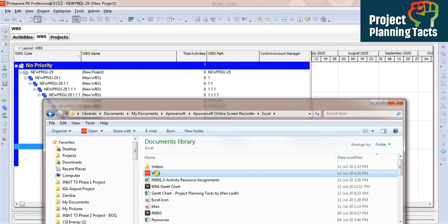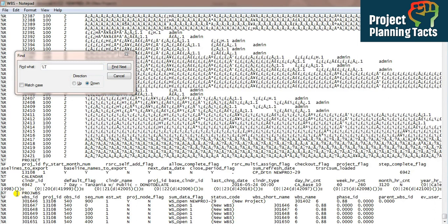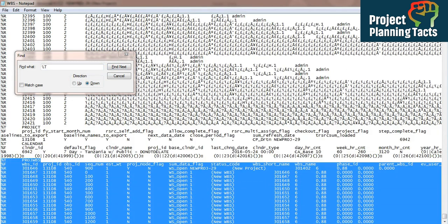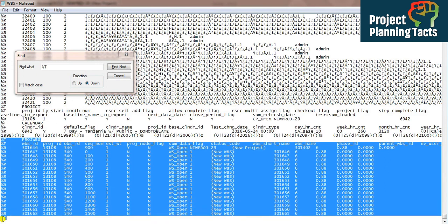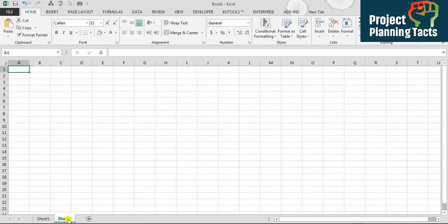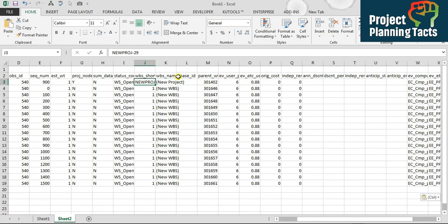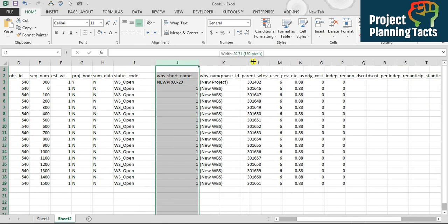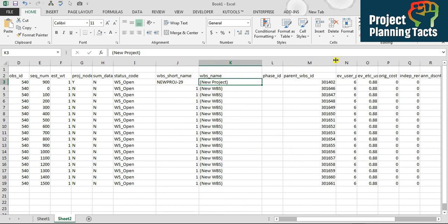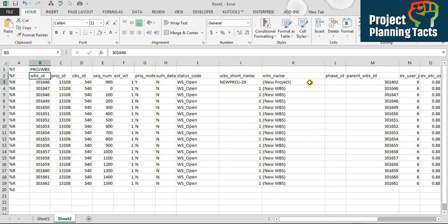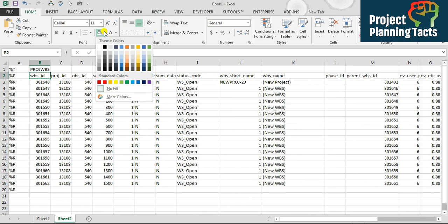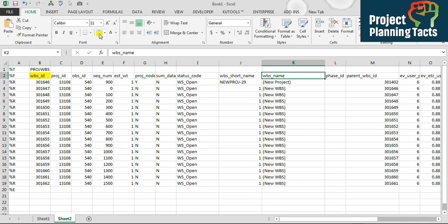I'll open the XCR file in Notepad by right-clicking and selecting 'Open with Notepad.' Looking at the file, it shows the project WBS section. I'll copy all the project WBS content — from the start to the end marker '%E' — press Ctrl+C, go to Excel, add a new sheet, and paste it with Ctrl+V. Now I need to identify and change the WBS short name, WBS name, parent WBS ID, and WBS ID fields.